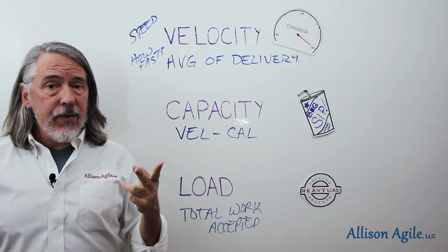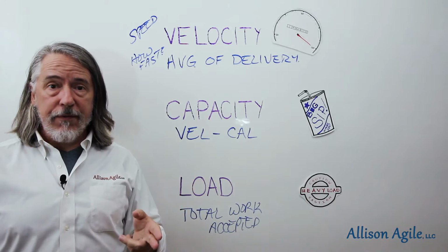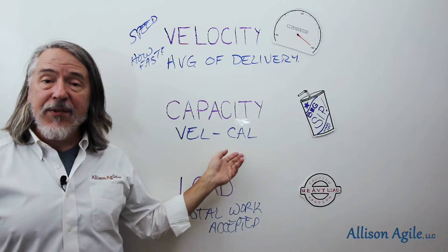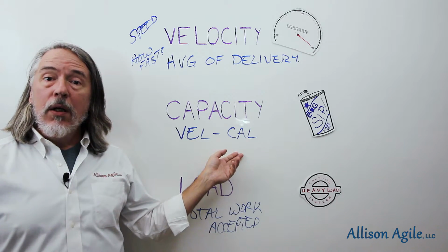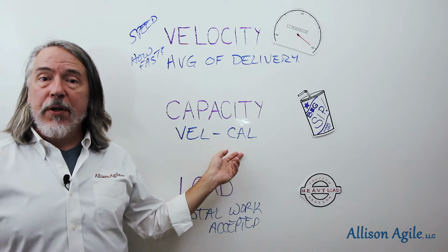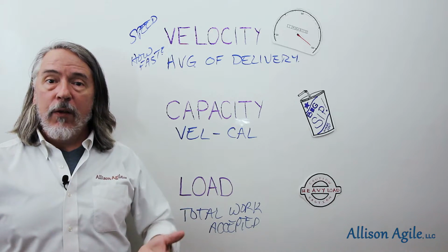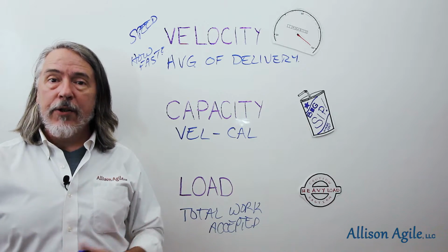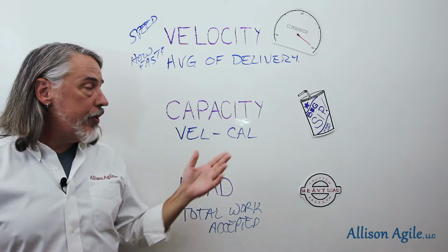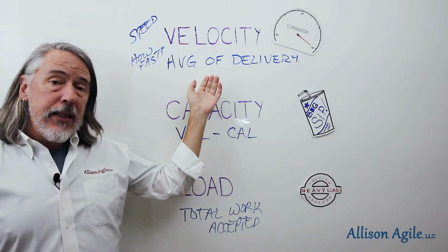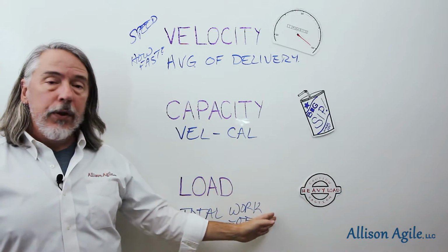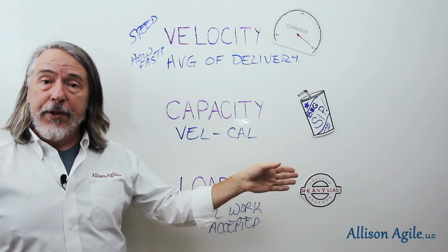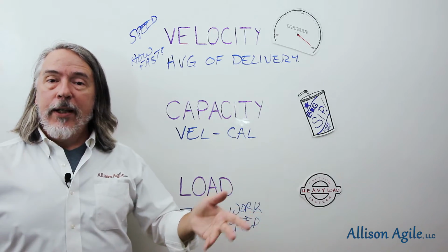The last 2 weeks of the year, from mid-December to 1st of January, your capacity will be plummeted lower than it would be for, let's say, first part of April, when everybody's working at their desk getting things done. So your velocity stays fairly consistent, your capacity might whipsaw, and then your load needs to be tracking whatever your capacity is.